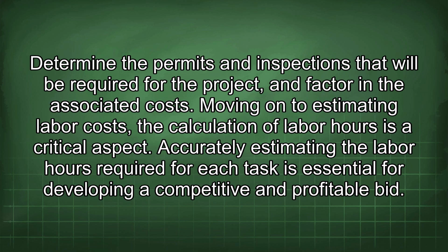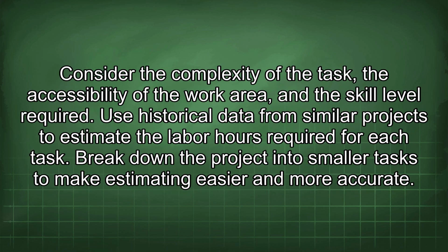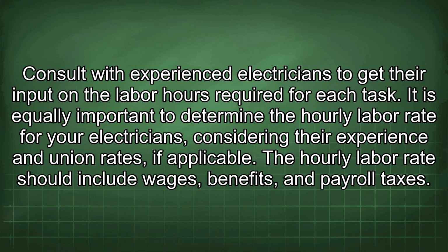Moving on to estimating labor costs, the calculation of labor hours is a critical aspect. Accurately estimating the labor hours required for each task is essential for developing a competitive and profitable bid. Consider the complexity of the task, the accessibility of the work area, and the skill level required. Use historical data from similar projects to estimate the labor hours required for each task. Break down the project into smaller tasks to make estimating easier and more accurate. Consult with experienced electricians to get their input on the labor hours required for each task.